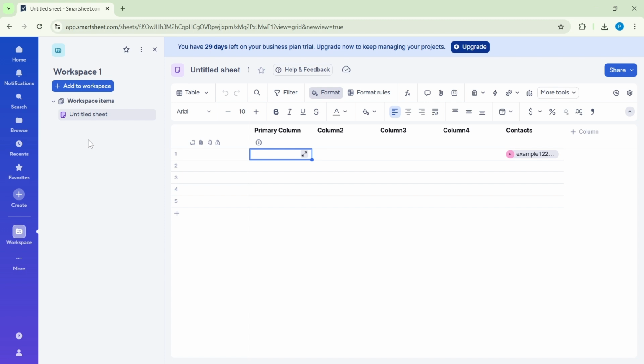Next, use AI to accelerate your setup. If you use Google Sheets, you can leverage Gemini to structure your Smartsheet data before importing. Ask it to generate a project template with columns like task name, owner, start, finish, duration, status, priority, and dependencies.